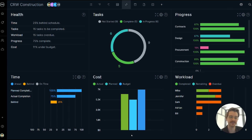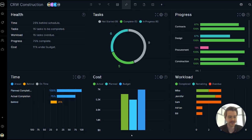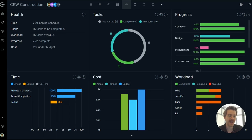The cost panel, pretty self-explanatory. It shows the budget, your plan costs, and your actual costs. So you keep noticing that it's comparing actual data versus planned data. For the dashboards to work properly, you really need to enter actual data and planned data so that you can track your execution.